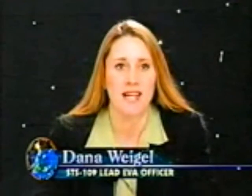Good afternoon. As you've heard from all of the previous briefings, we have five challenging back-to-back EVAs. They'll be done on flight days 4 through 8. John Grunsfeld and Rick Linnehan will be doing EVAs 1, 3, and 5. Jim Newman and Mike Massimino will do EVAs 2 and 4.